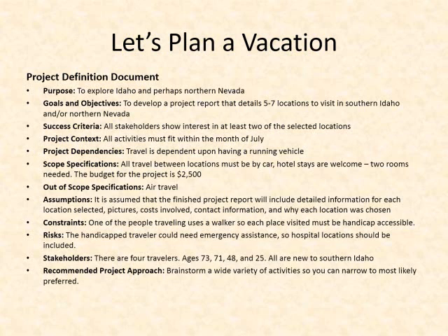You would ask another question. So how will you know that the project report meets your needs? Well, there's enough detail that all stakeholders show interest in at least 2 of the selected locations. Okay, you continue on with your questioning. What are some of the limitations or challenges that we need to consider? Well, the only month that I have available for this is July, so all of the activities that you come up with need to fit just within that month.